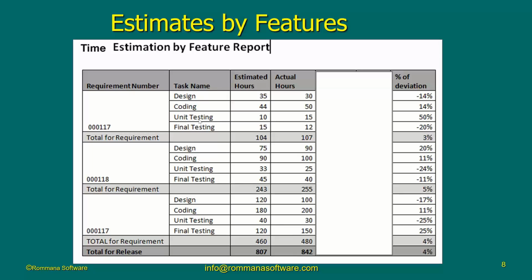I understand. In a very informal Agile project, a team member will pull out a user story and start working on it. But doesn't it make sense for the team member to say, okay, I'm going to do this user story and I think it's going to take 8 hours? I understand that the user story is brief. That's why some people say it's hard to estimate. Well, if the user story is too brief to the point that we cannot estimate, that's not good then, because we are going to build the user story in a very unknown environment.